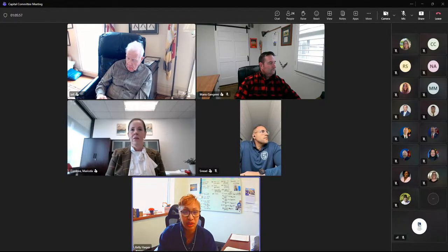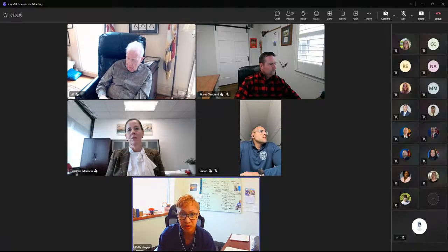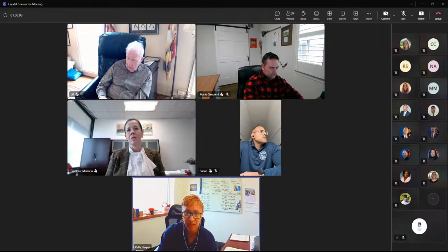So recent progress. The work is 97% complete. We are at 87% time. We are ahead. That's our photo right there of our last partnering meeting where we took a photo with Blast Tech. They have their subcontractor there. Our scheduling folks are there. Safety guy, our QC folks are there. They've done an amazing job on this project and kind of keeping the pace and kind of getting us finished up on time.